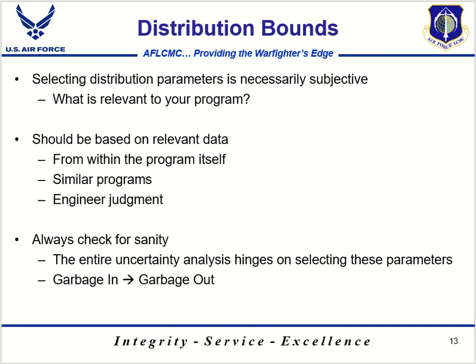Selecting the bounds for the distribution is necessarily subjective, and you need to be considering what makes sense for your program. The goal is to have the bounds anchored in relevant data, whether that's from subject matter experts within your program office or from more concrete data sources. The analysis really hinges on these bounds, so you need to be careful as you define these. And remember here at the bottom, garbage in, garbage out. So the quality of the information that goes into helping you define these bounds is definitely important as we consider this.